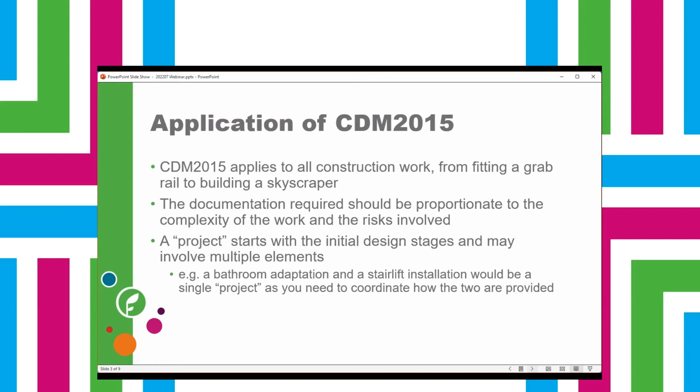I suppose first of all to say that it applies to all construction work, from fitting a grab rail to building a skyscraper or a bridge. But the difference is that the level of documentation required is proportionate to the complexity of the work. And a project starts from the initial design. So as soon as you start to think about how things would be fitted or designed within a project, that's when the CDM regulations start.